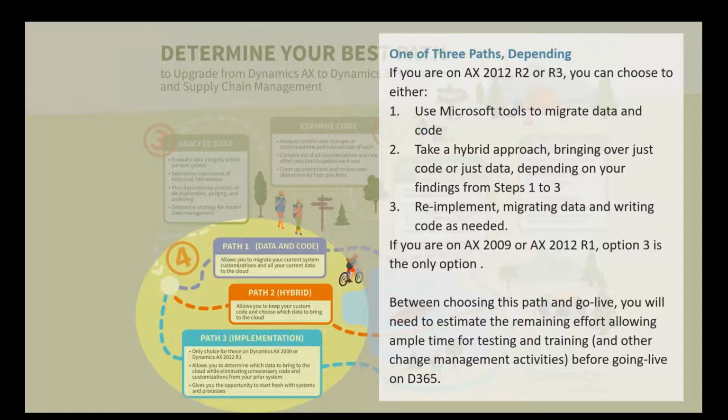You think about concepts inside of ERP systems or business systems in general nowadays. You've got dimensions, you've got main accounts, all those concepts, for example, that you have in 2012 R3, they carry over into Dynamics 365. Those same exact concepts, the forms, the views that you have from an end user training perspective, there's a lot less effort that's required to go through that training life cycle compared to a new product. But at the same point, you get the advantage of having total control in terms of your data and your code. And if it's a very large customized environment, you can actually save a pretty significant amount of money by going through a re-implementation process.